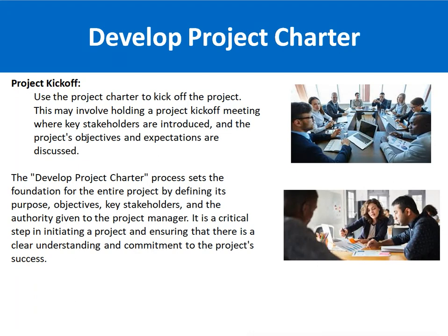Then project kickoff. Once the project charter has been developed, the kickoff meeting has to be held, which may involve holding a project kickoff meeting where key stakeholders are introduced and the project objectives and expectations are discussed in detail. So the project charter process sets the foundation for the entire project by defining its purpose, objectives, key stakeholders, and the authority given to the project manager. It is a critical step in initiating a project, ensuring that there is a clear understanding and commitment to the project success.